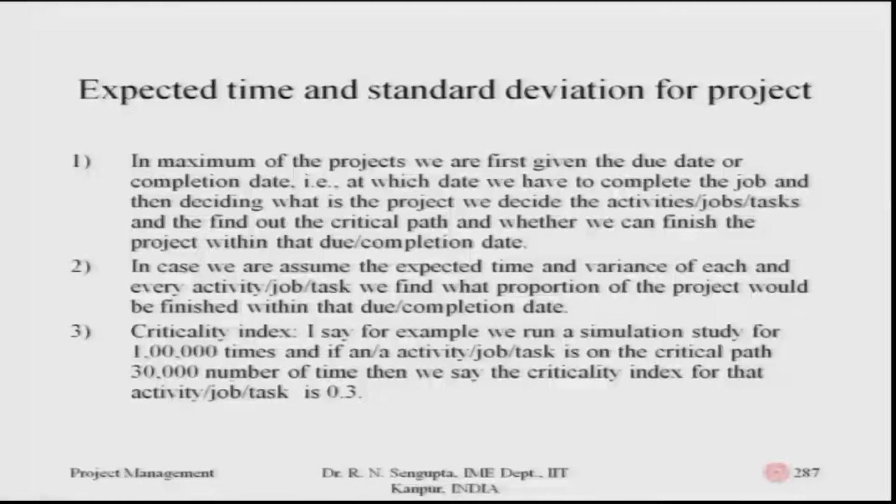So, in most projects we are first given the due date. Now we are trying to come to the concept of the due date. In the last slide, slide 286, you saw how the normal distribution was done, where T was the average or expected time for the whole project considering the critical paths. Then you found the standard deviations and added them to the right and the left, considering 2 standard deviations over the overall coverage of area.